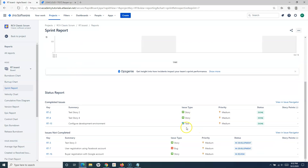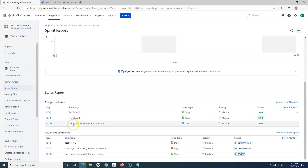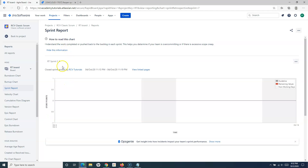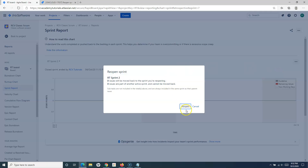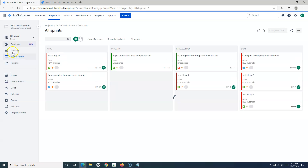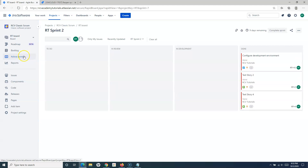The three issues that were closed in RT Sprint 2 are Test Story 2, 4, and 15. So those three — RT2, RT4, and RT15 — should be moved back to RT Sprint 2 once we reopen it. Let's reopen it and verify that we now have two parallel sprints in the active sprints view.